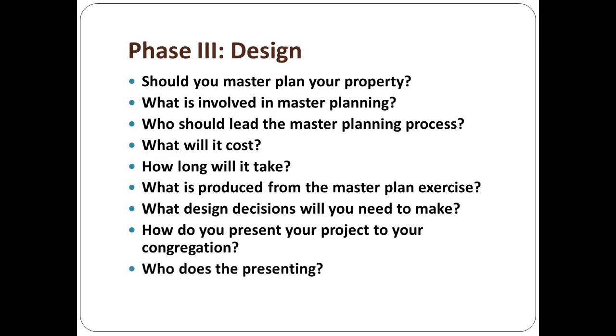And so when you're going through this, your congregation should be apprised because you're utilizing their input for all the ministries to determine how to design it during the schematic and the master planning time, so that you've got some full solid development before you go into construction drawings, because it's expensive to start making changes after they go into that full detail. Who does the presenting of it?